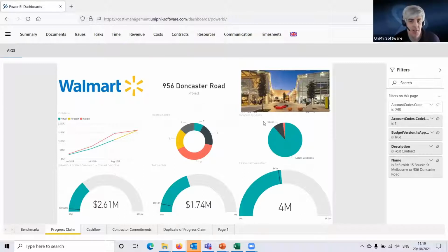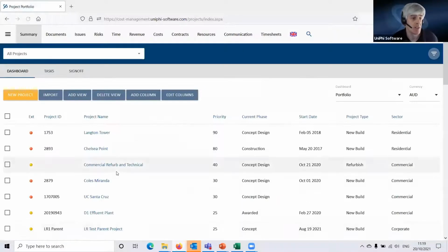Here's some information about variations, the source of variations proportionally, some gauges there measuring progress against budget, and our cash flow S-curve there, the budget, the actuals, and the forecast. So this is all being fed from the information that we're going to be playing around in and creating over the next 3 weeks. The next level below that, which is the dark blue, is the filter level.